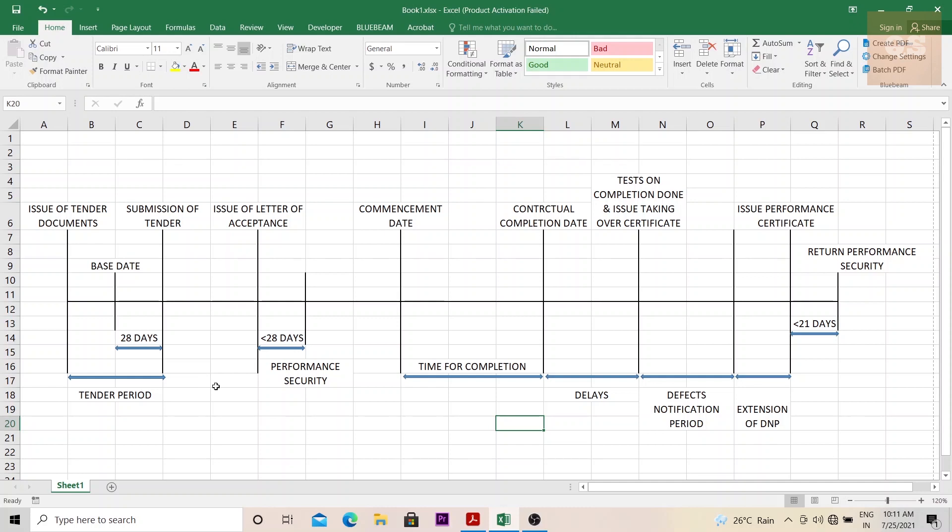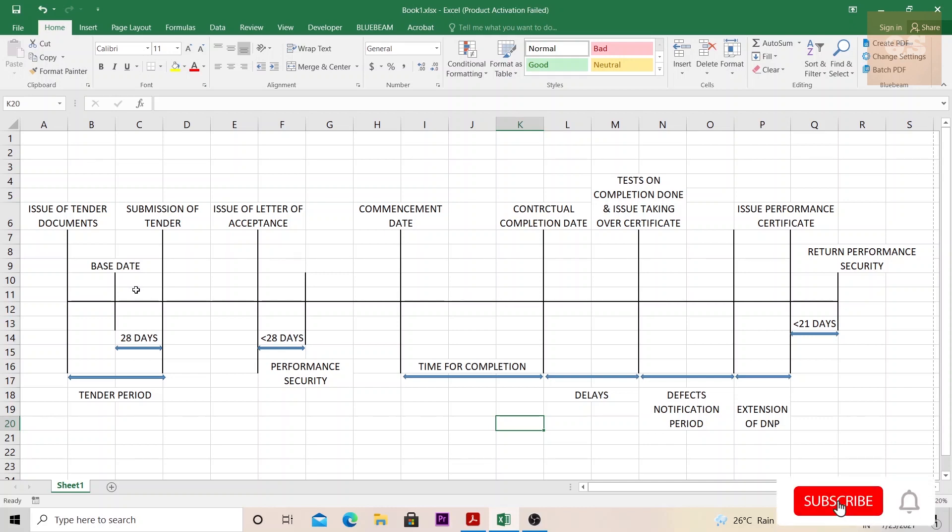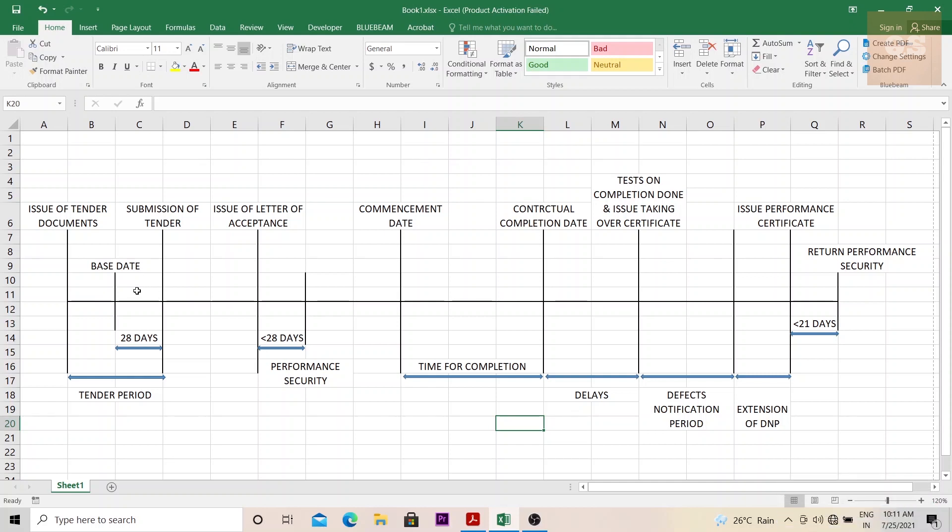Another thing regarding the base date is before this base date, all the data regarding the subsurface, hydrological, environmental conditions of the site, all these data needs to be submitted to the contractor so that they can get the clarity and do a proper quoting of the project. And even after the base date, if the employer is in possession of some new data regarding the site, that also needs to be submitted to the contractor so that there is proper clarity and they can use this data to improve their quotations.